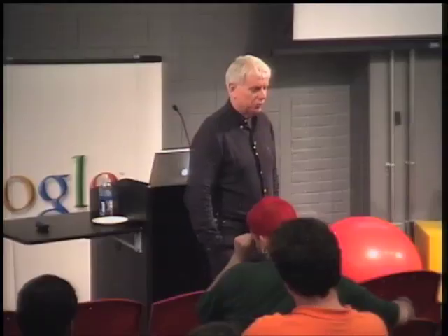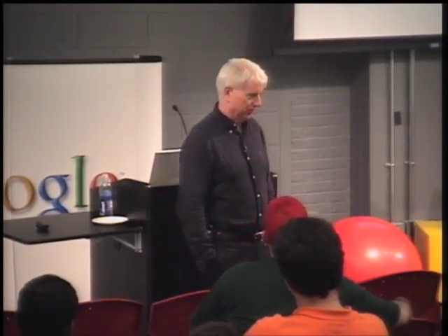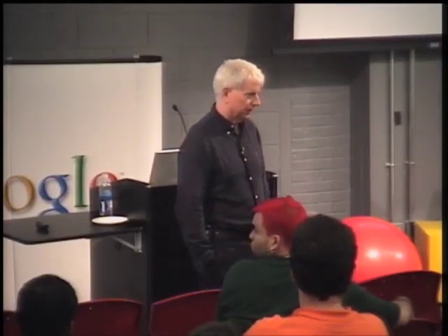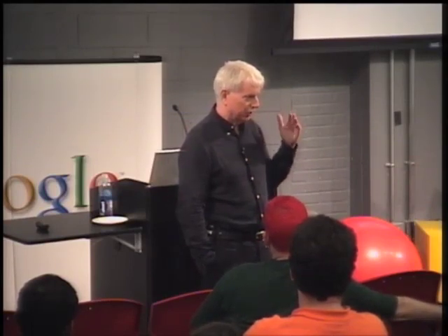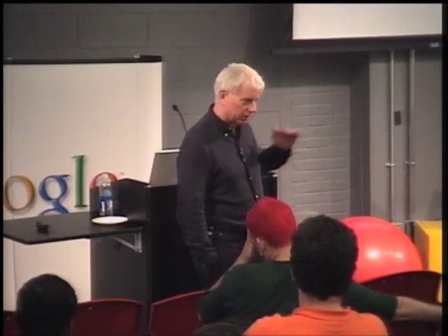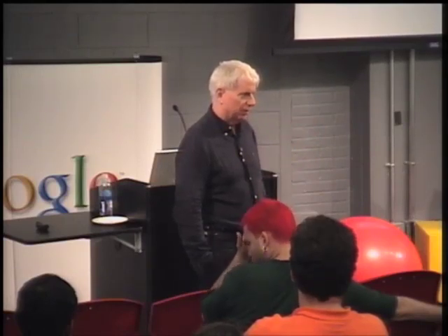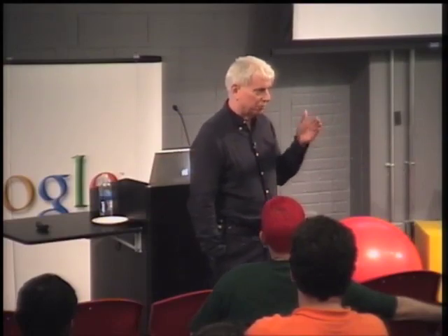Well, the rule of thumb we use for Scrum teams is if you go to more than 1 team, your velocity doesn't double. 1.4 is more likely. So you're going to take a big hit. Unless you do what Xebia does, and that is very carefully set up a strategy that works. Systematic has done the same thing, demonstrated linear scalability, and so has Xebia Labs. But it sounds like you have good Scrum teams running XP inside. You should be able to figure out how to do this. It just has to be done very carefully, and you have to be able to measure it all the way.